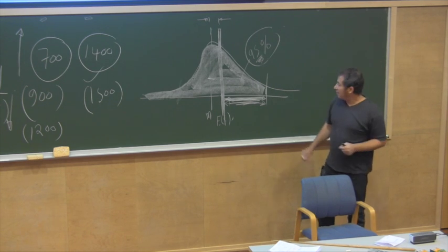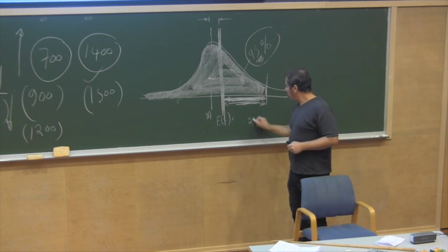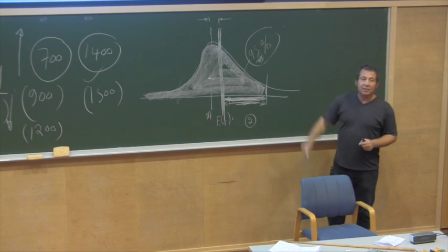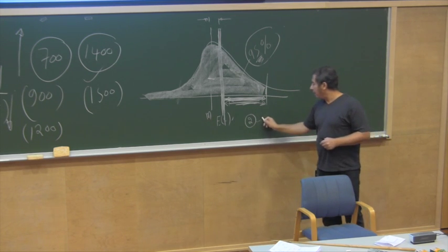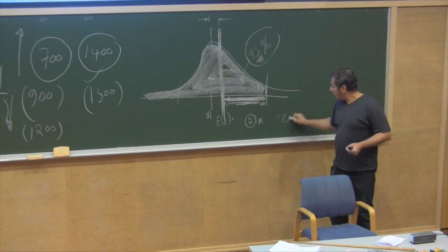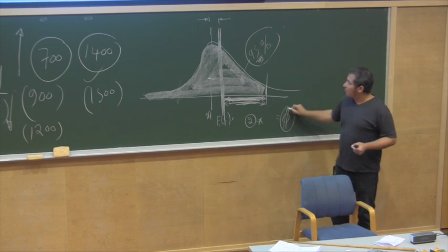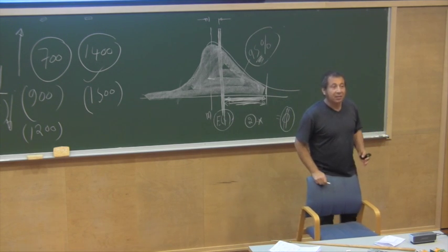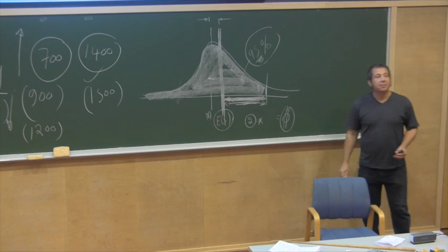And it is around 2 standard deviations. So we calculate the standard deviation and multiply it by 2, which gives us a number, and this number we add to the expected value, then we are at 95%.